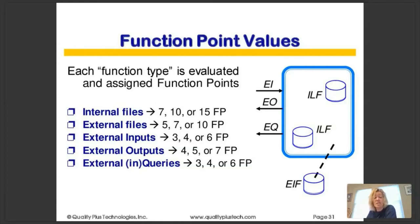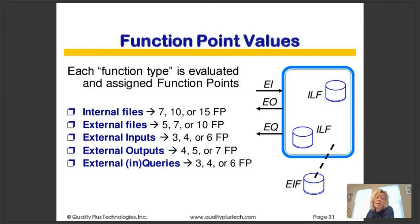We look at internal files, external files, inputs, outputs, and queries — and there's an entire methodology that is an ISO standard, a worldwide global standard for how many points and exactly what counts. Internal files are worth 7, 10, or 15 function points. External data is worth 5, 7, or 10. External input processes are worth 3, 4, or 6 function points. Outputs, which contain calculations or derived data, are worth 4, 5, or 7. External queries are worth 3, 4, or 6 function points. Each component gets a certain number of function points and we add all those up to give the floor plan size.